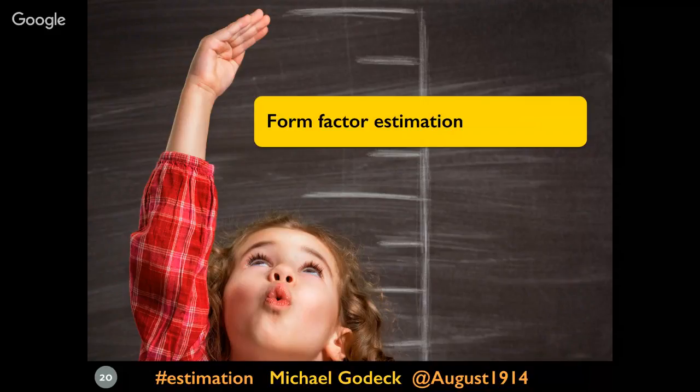So t-shirt sizing is a really common exercise. It's like a form factoring exercise that's used in backlog refinement. And to do it properly, here's an opinionated piece, the sizes should be considered to be on an ordinal scale. That's to say, 3 smalls don't necessarily add up to a medium, right? Medium is just bigger than small. Because as soon as you start equating the set members, medium, with rational values, like the small is a half day, medium is 2 days, you see these scales all over the place where people tell you what the equations are. Why not just use the time, right? Because now you're mixing metaphors between ordinal and rational scales.